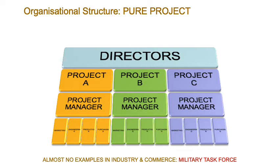In a Project OS, the directors are still at the top, but work is arranged by project. Say you have three projects — A, B and C — each with its own project manager, and each project manager has their own marketing, engineering, production and purchasing staff. It's very different from the functional OS. It's not very efficient either — you can imagine this is how the military would operate. Why have separate engineering and marketing staff for each project when the same staff could work across all three?